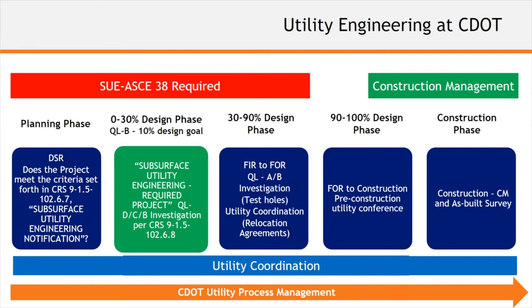You'll see at the top left in red, from Planning Phase through about 90% design, we're conducting SUE investigation, gathering existing utility information, and test holes. On the bottom, you'll see the blue utility coordination, which begins at planning phase and works all the way through to the construction phase. Upper right in green is the construction management phase, beginning at about 90% with early relocations and running to the end of construction. The green in the middle is really the focus on the utility conflict matrix and where it's used, at around 30% design.